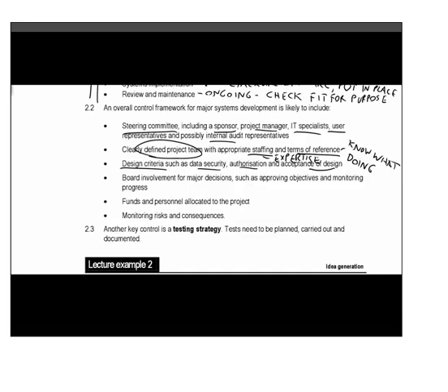You would expect to have, for a project like this, design criteria. So right up front it should be very clear what the policy is and what the standards are in relation to, for example, data security. So people will think right at the start about how the data is going to be kept secure, what the levels of authorization are going to be for changes or for inputs, and when you consider the design to be accepted. So who needs to sign off to say that, yes, we're happy with the design? Clearly the steering committee will need to sign off, but it may be that other groups will as well.